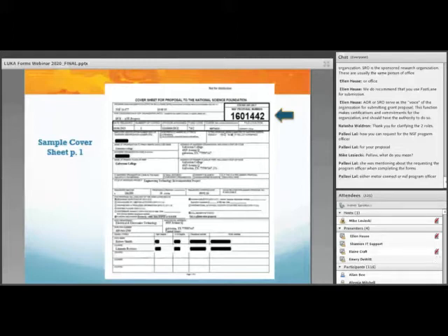Choosing a mid-semester start date will make it difficult or impossible to get people started working with the grant support. Don't choose a date that's too early in the calendar year. This could result in receipt of your award notice on or after your requested start date, which puts you behind from day one. Don't expect to be able to change that start date once it's set by NSF in your award.